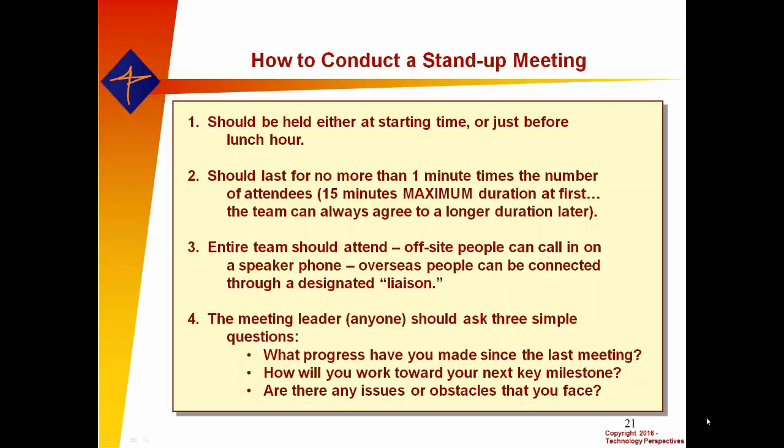And by the way, the duration of the stand-up meeting is critical. 15-minute duration for the formal part of the meeting, which is where each person reports, speaks, and we go around the team. We have an informal after meeting for any parked issues that come up that require more discussion. But if we stay focused and we keep it energized, 15 minutes is entirely reasonable, even for a team of 10 or 15 people. What do people say?